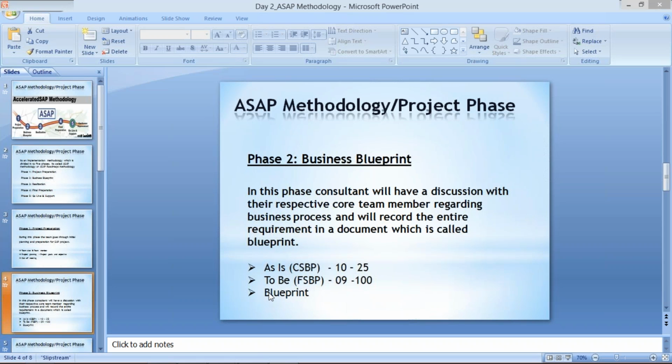It means it's a kind of commitment. The things which we have specified in the blueprint document, you must deliver till the end. In the sense, whatever things we have mentioned in the blueprint we must deliver, then only we can expect the final amount from the client side.